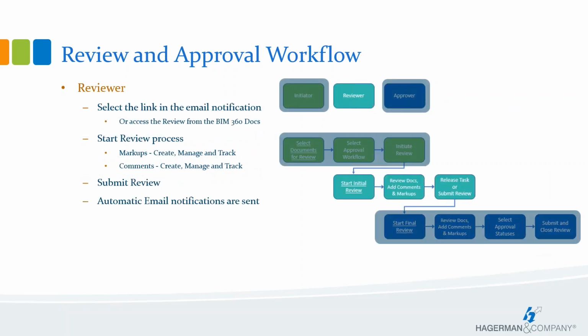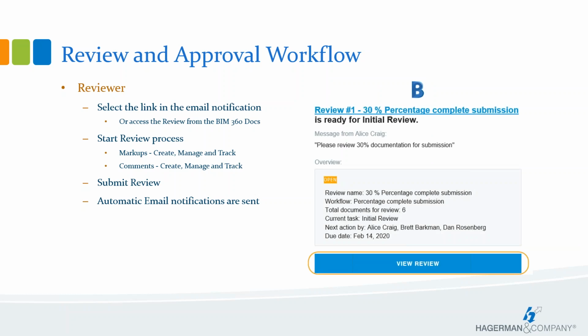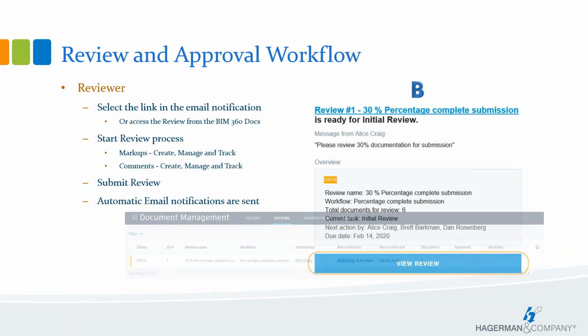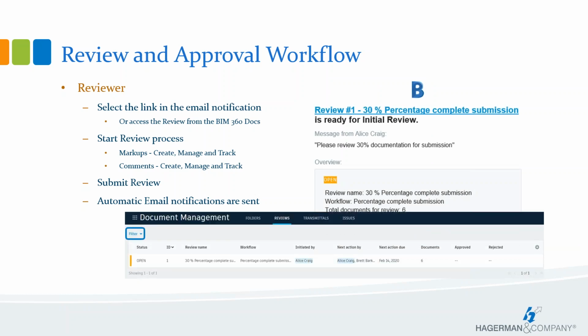The team members assigned as a reviewer will then go through the review process with the ability to add markups from within the BIM 360 viewer, add comments for each document. To participate, the reviewer can select the link in the email that was automatically sent to them, or by going to the Review tab in Document Management.